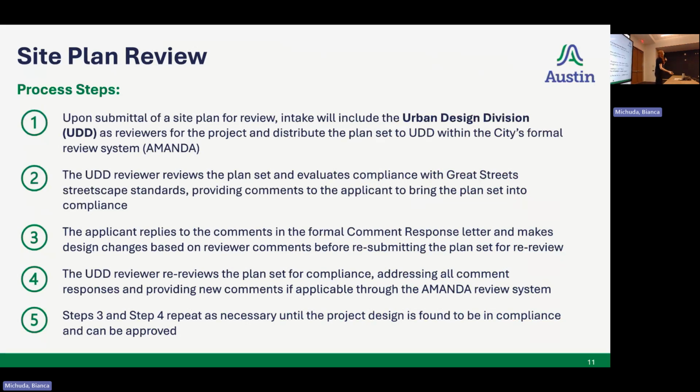Please also, if you can, reach out to Urban Design to make sure that we have a heads up that that's coming our way, so we know in our internal review system in Amanda to look for that review as well. Two is the reviewer: Urban Design reviews the site plan, and we make sure that it is in compliance with the Great Streetscape standards.